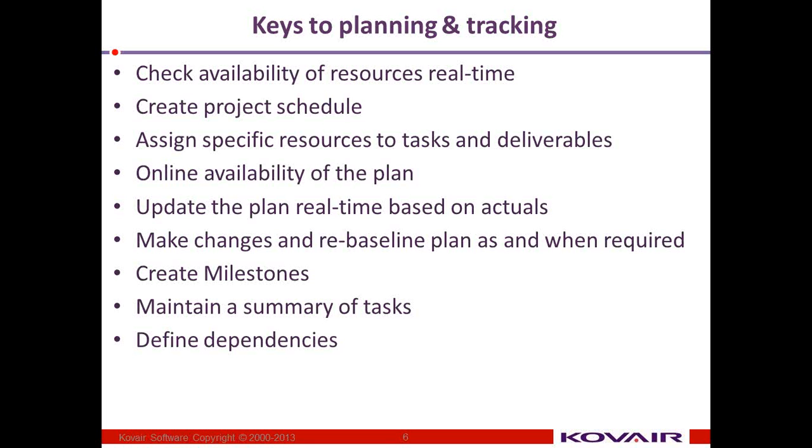Then another key thing is to update the plan in real time based on actuals. This is another very important aspect in terms of the variance we talked about a few minutes back. Because until and unless we have the true picture in real time against the plan, that okay, this was my plan and this is the actual beside it, we will not be able to take corrective actions if necessary.